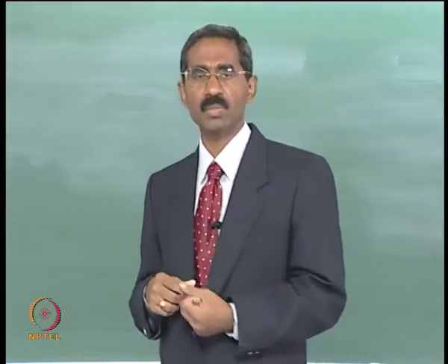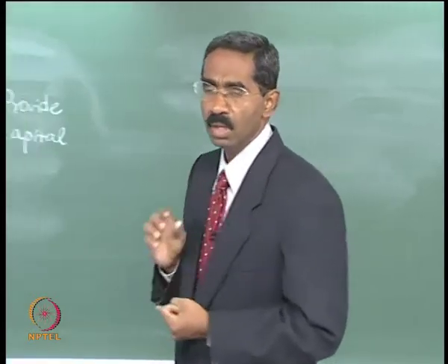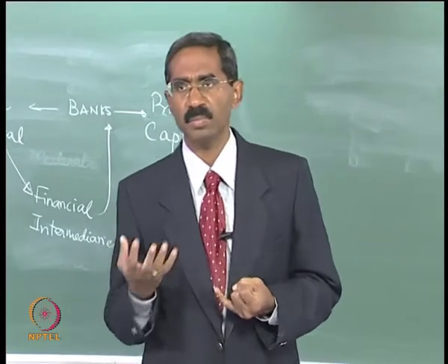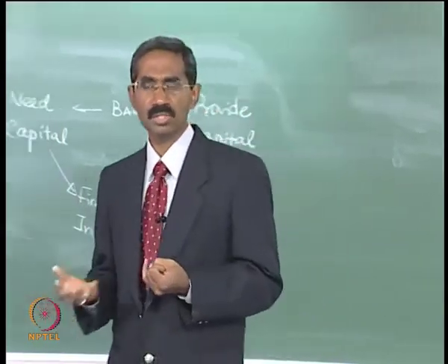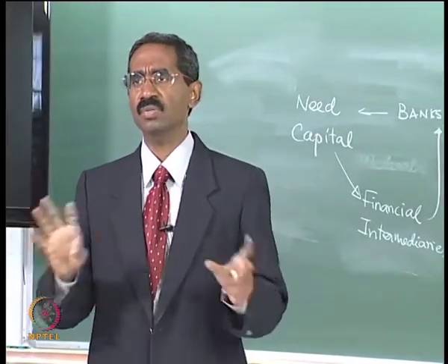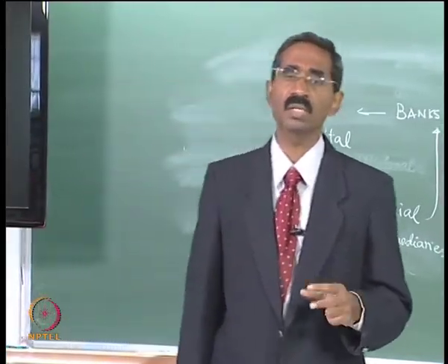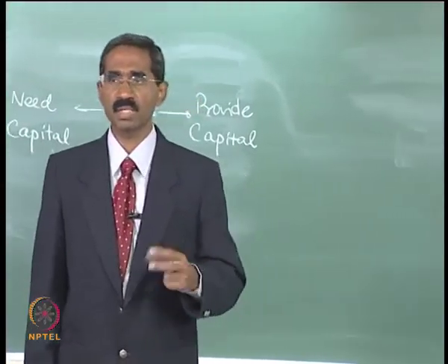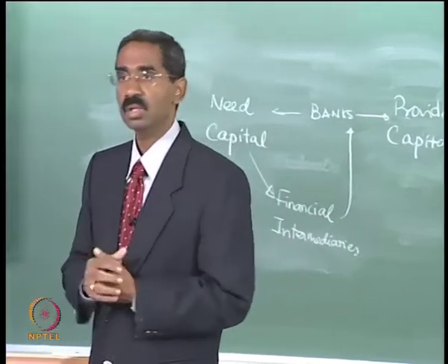The major contracts could be a fuel supply contract, it could be a customer agreement like the power purchase agreement, it could be engineering, procurement, construction contracts, and so on. So there is an entire list of contracts that are needed for the project finance company, and the advisory services firm can assist the sponsors in the various arrangements.